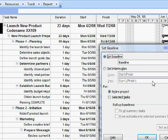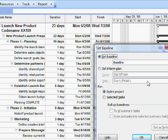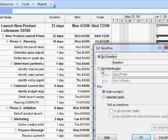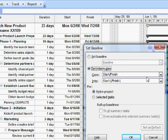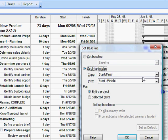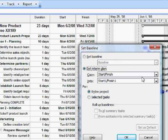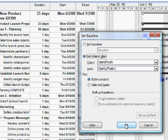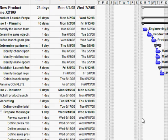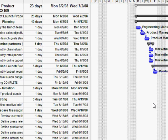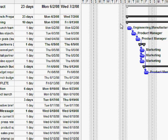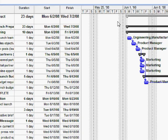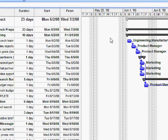Take a look at what happens when I do that. When I click here, for every task in the project we've copied the Start and Finish dates into two additional fields: the Start1 field and the Finish1 field. When I now click OK, of course we don't see any immediate difference, but I'd like to show how that act can make it easier to track progress.